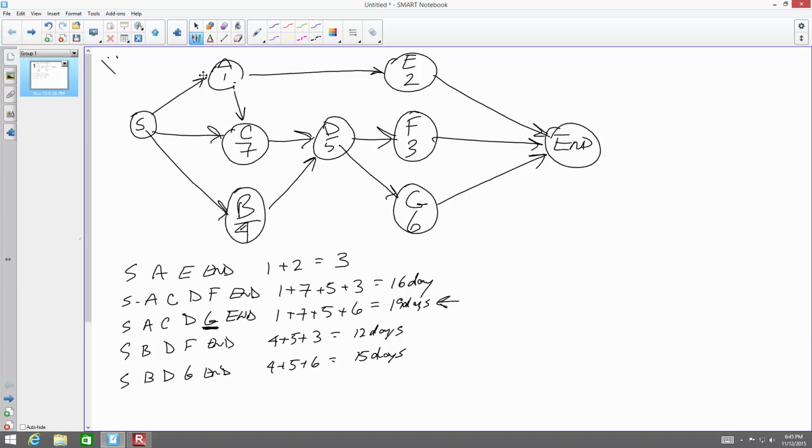Project cost accounting is done by your accounting department as the work progresses. So you win the work, and as the work goes along, that cost accounting department keeps track of how your billings are going and how your project's progressing, so you know whether you made money or not.